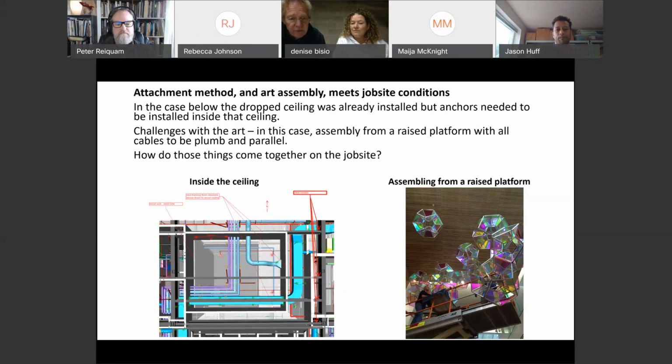What they could give us was not necessarily an as-built. It's certainly not an engineering or architectural drawing, but it is an image that they put together depicting as best they could remember what we would see when we dropped that ceiling. There weren't as-builts available. There was only the original architecture and engineering available. They commented to us that they could not guarantee that some of this HVAC system and mechanicals buried in that ceiling would be in the exact locations that we could see from either the architecture or even this. This is a pretty-to-look-at digital cocktail napkin type of drawing that we were expected to use.